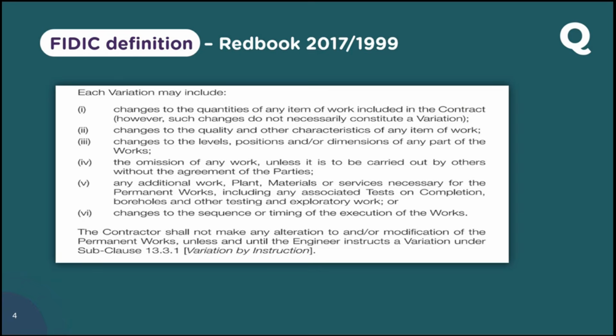And if you take a building example, originally your ground floor is 0, 0. Now you decide to increase it by plus 0.50 for drainage requirement, because the flood is there. It was 0, 0 initially. You decide to add plus 50 for drainage requirement. Again, here also there will be extra backfilling, steps to be provided, and an access ramp to be provided. So this is an additional requirement or additional work for you.